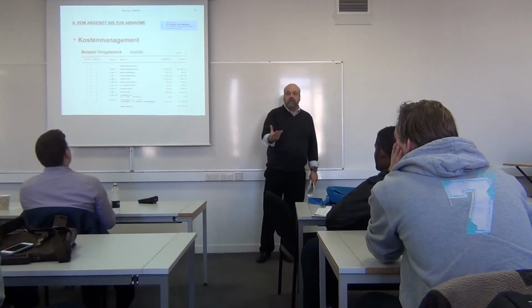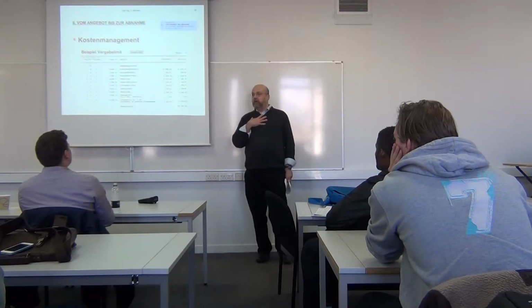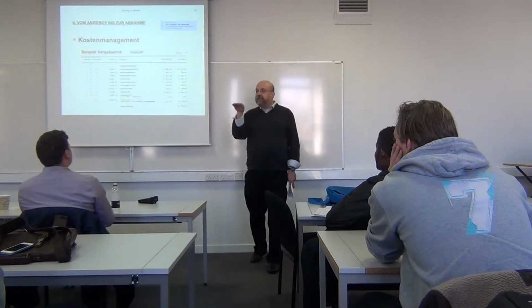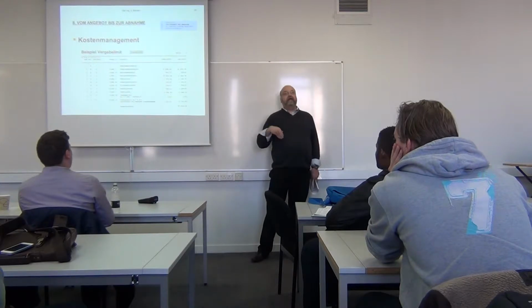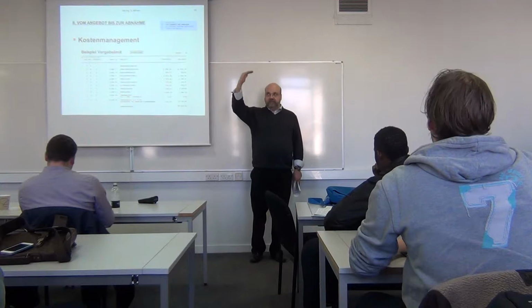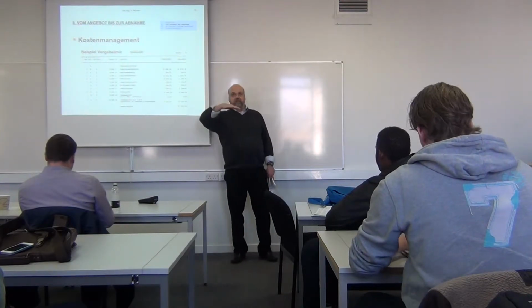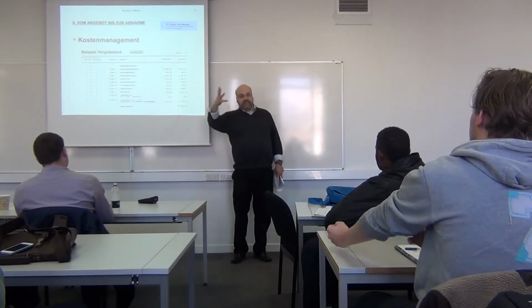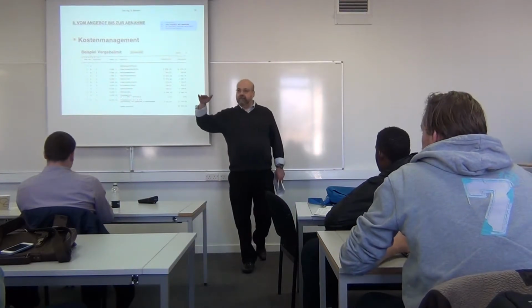Before I give a contract to my subcontractor, I have to know what the limit is, up to which sum I can give him this contract, so that if I have 50 contracts, I wouldn't exceed my sum.